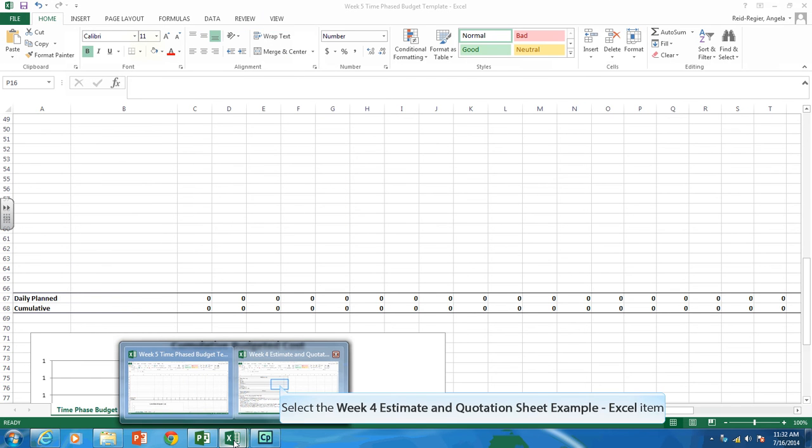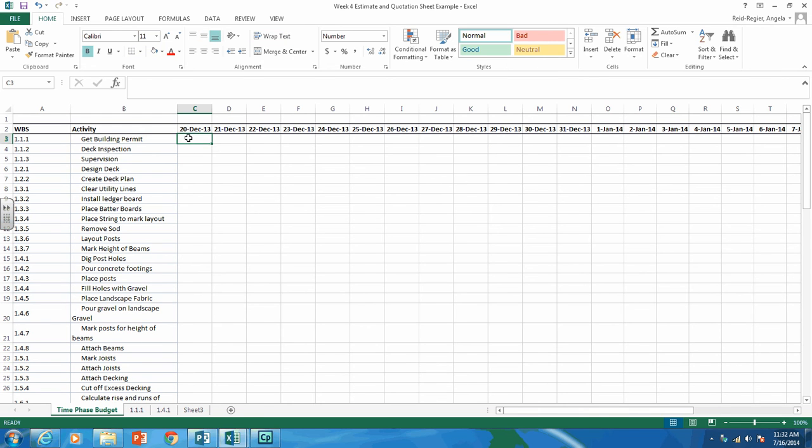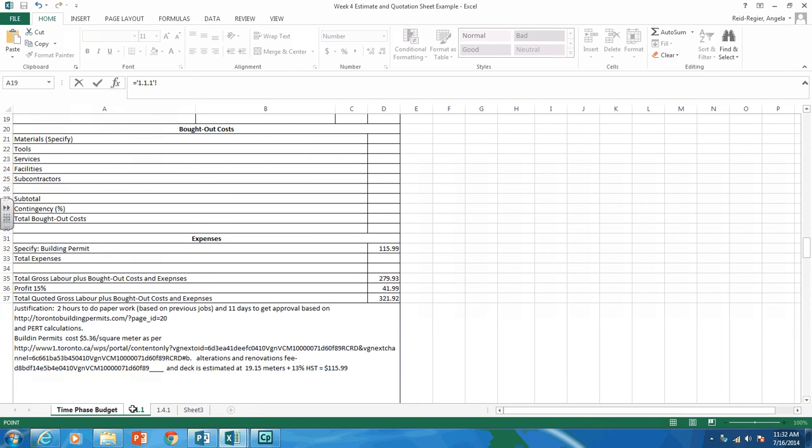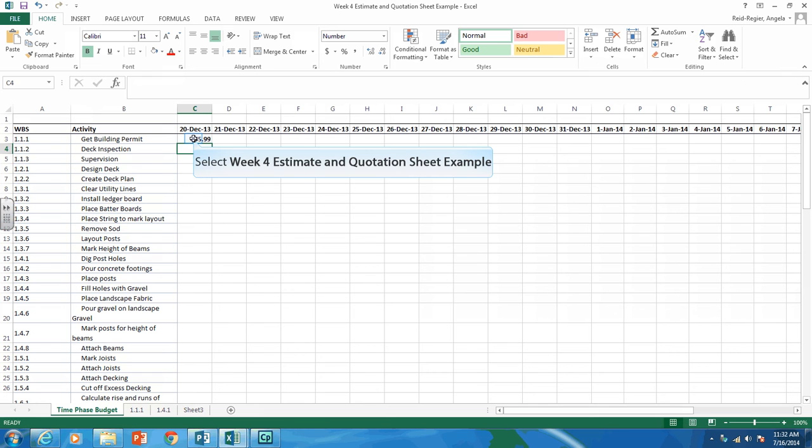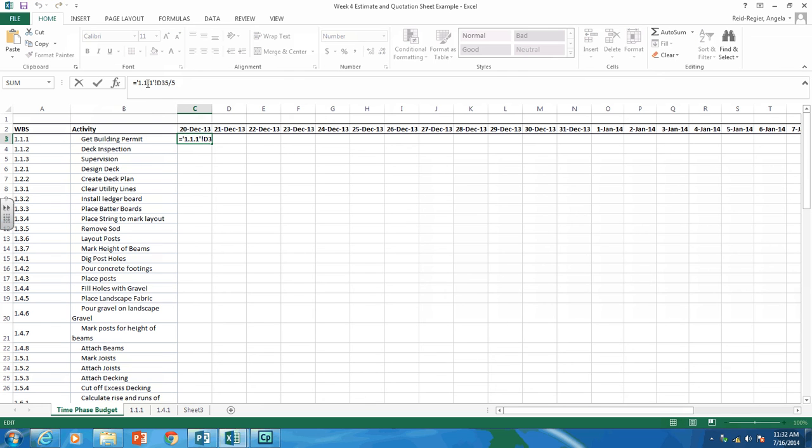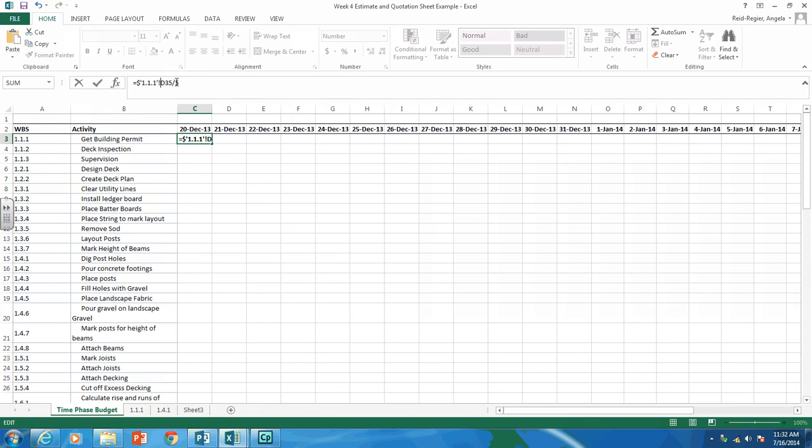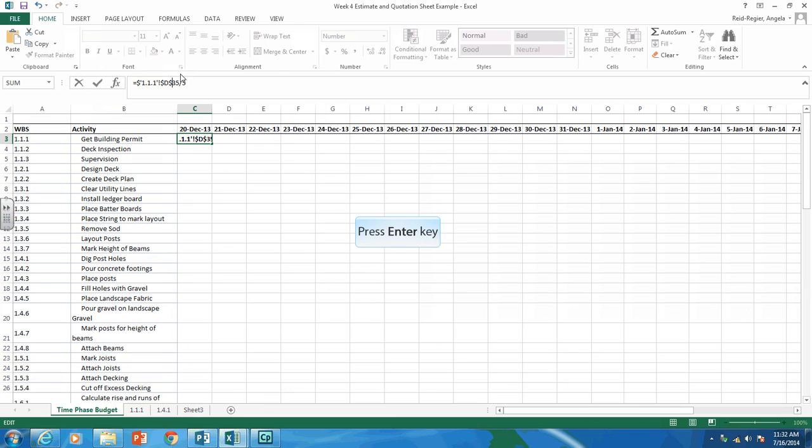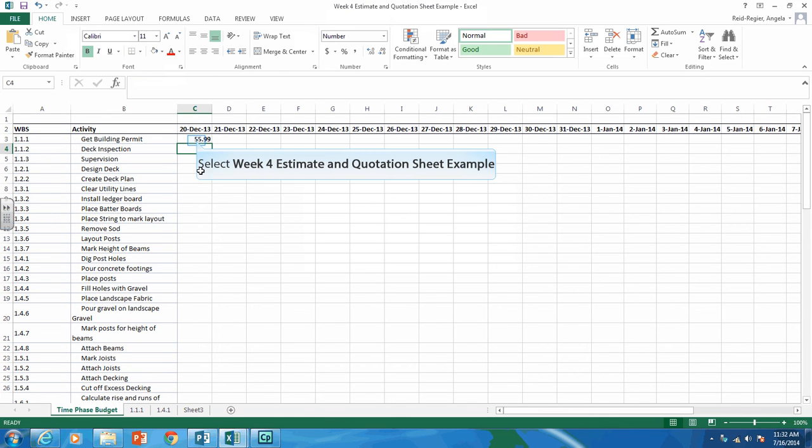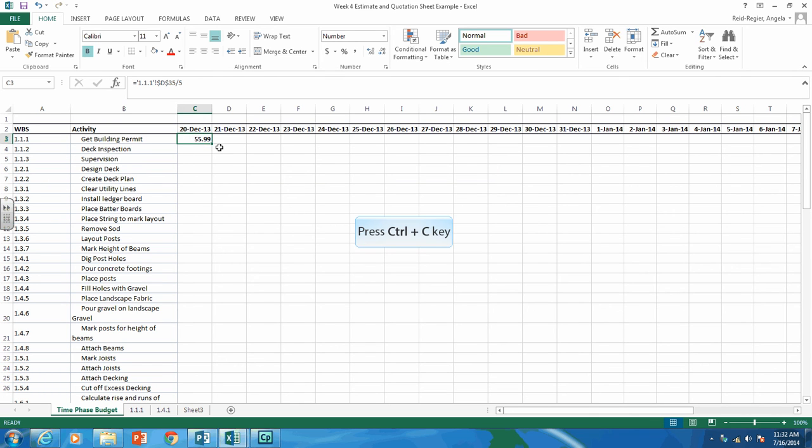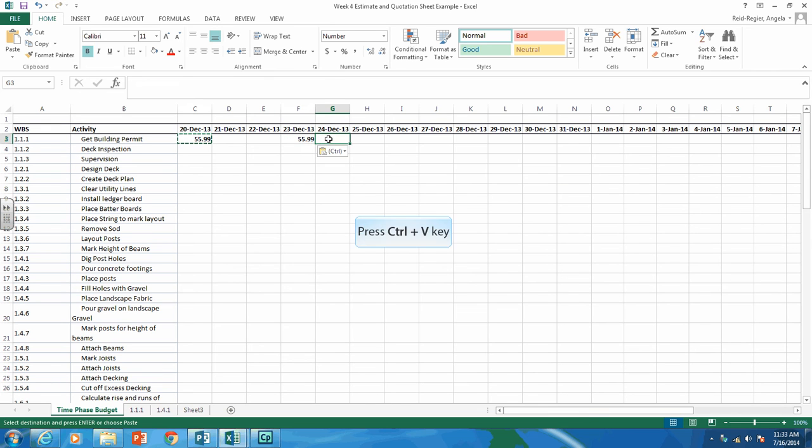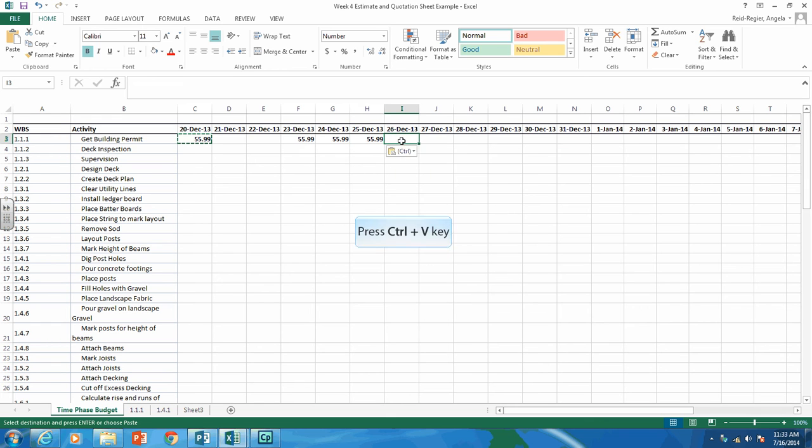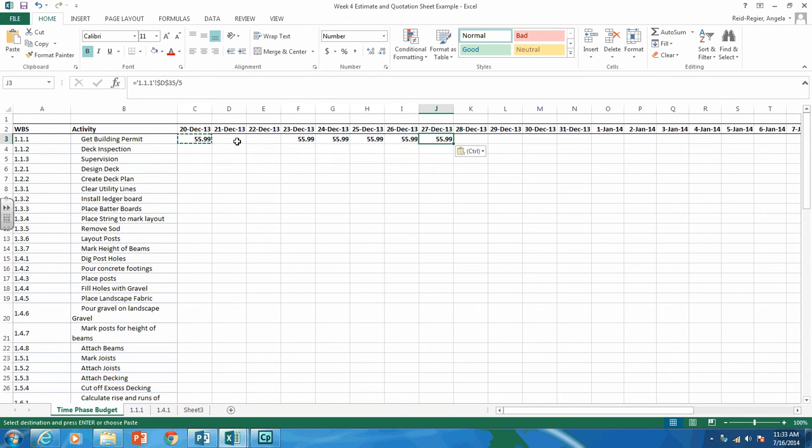So that's what we're going to have to do. So on our time phase budget, how you can do this, it starts on December 20th. So put your cursor in there, click on that cell, hit the equal sign, go to 1.1.1. Click on the total gross labor plus bought out costs. And I want to spread it over five days, so I click on that, divided by five. So each day we're spending $55.99 on it. Now I'm going to put a dollar sign on this. And that means I can copy and paste this formula. So I'm going to click on $55.99, copy, and paste it over the five days. And as you can see, I have done it from the 20th to the 27th, and I have left out the weekends.